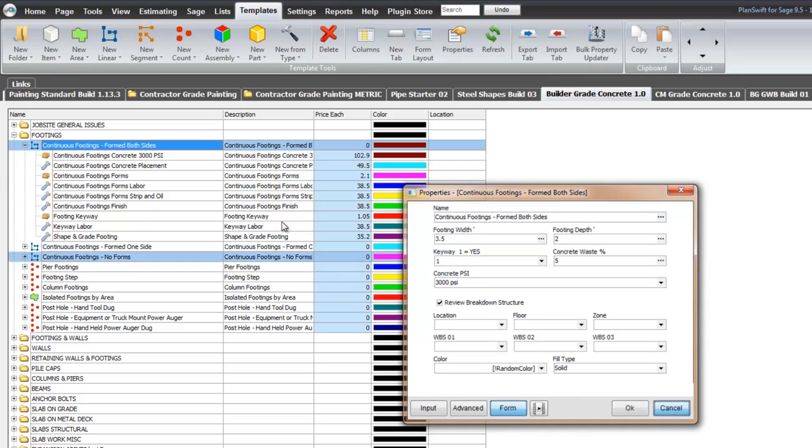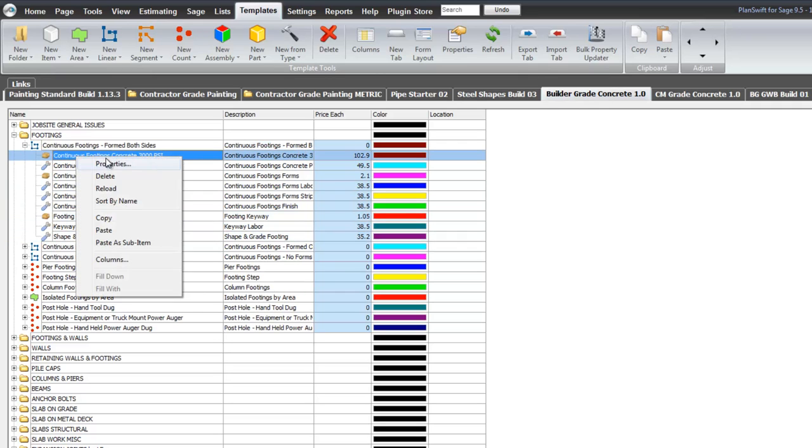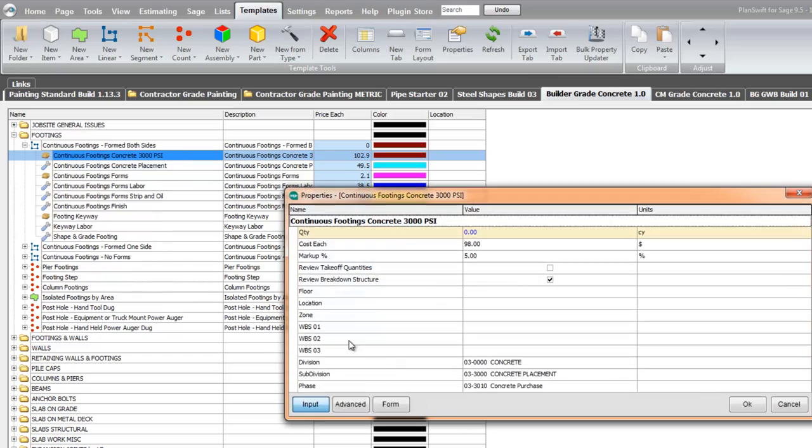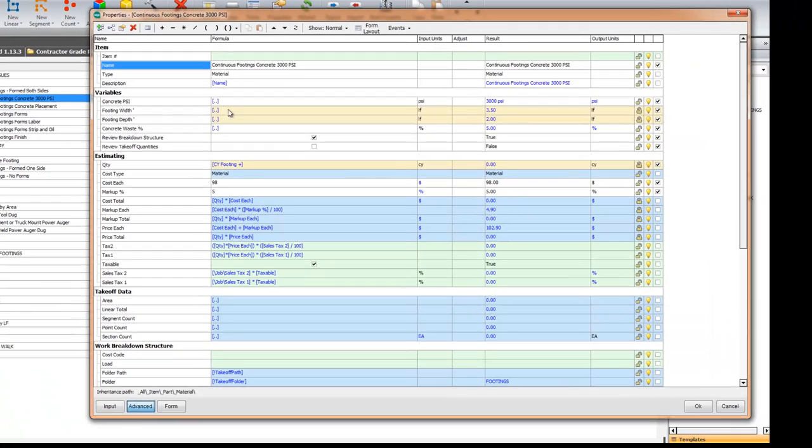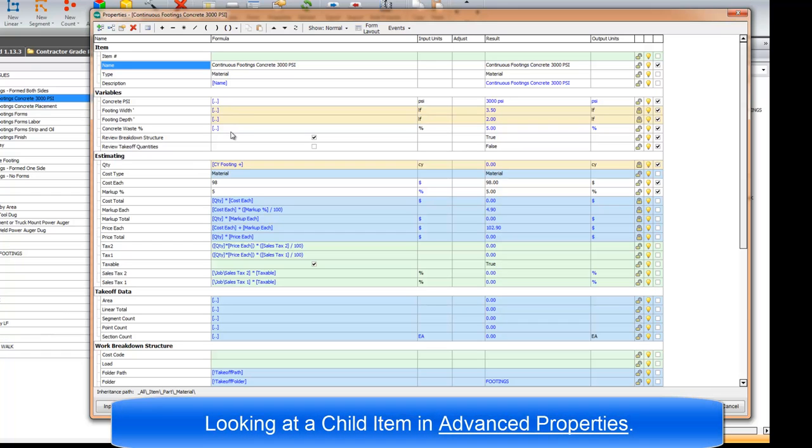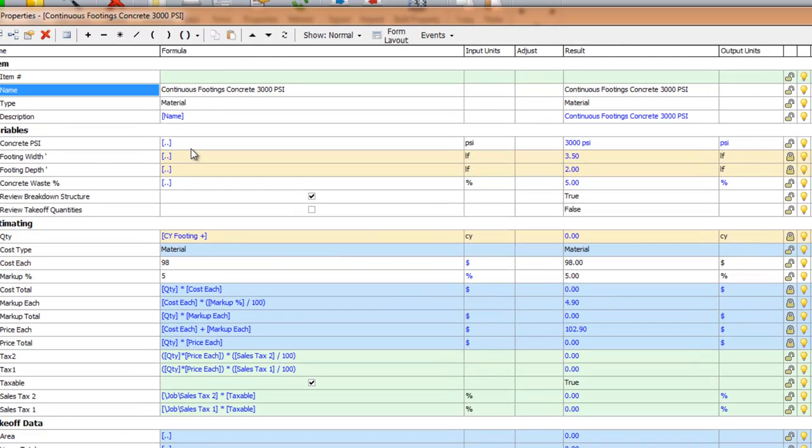At the child properties, which are underneath the top level here, each of these values that have been put in, and I'm going to look at Advanced, is inherited by the child. See this bracket dot dot bracket? That means inherit the value from the line above or from the parent. And if you look over here, you can see that these values are inherited. 3,000 psi, 3.5, 2, 5 is the concrete waste percent.